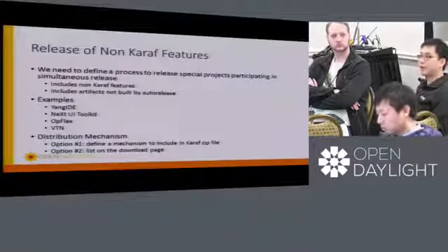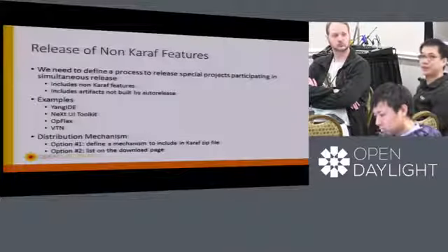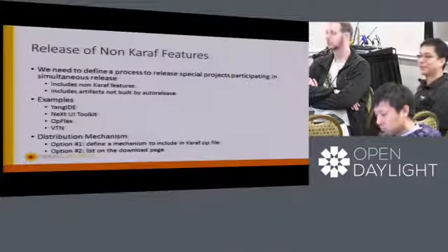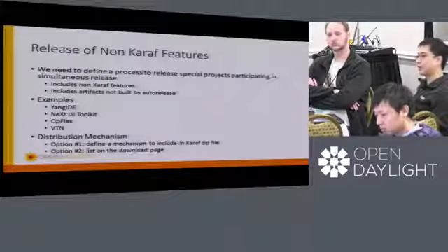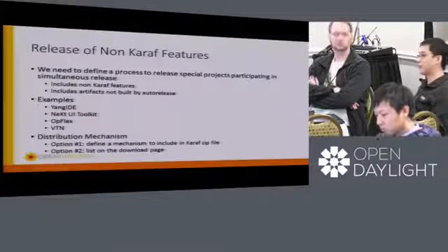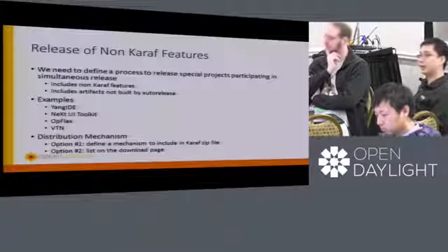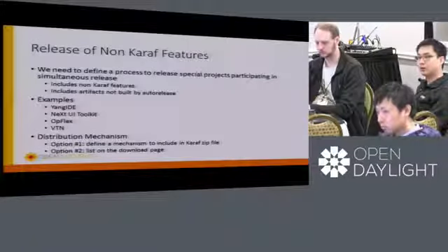in the last release, we had several projects drop out at the end. But at the same time, they spent so many resources up to that point. Right? Instead of just accepting every project right at the beginning, there needs to be some time frame in which they have to prove that they're going to be able to. Right.